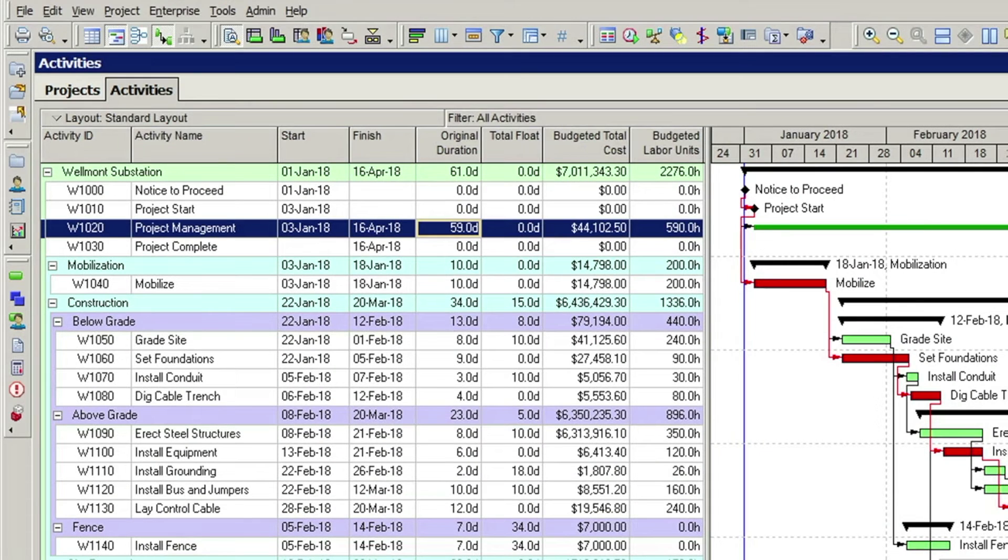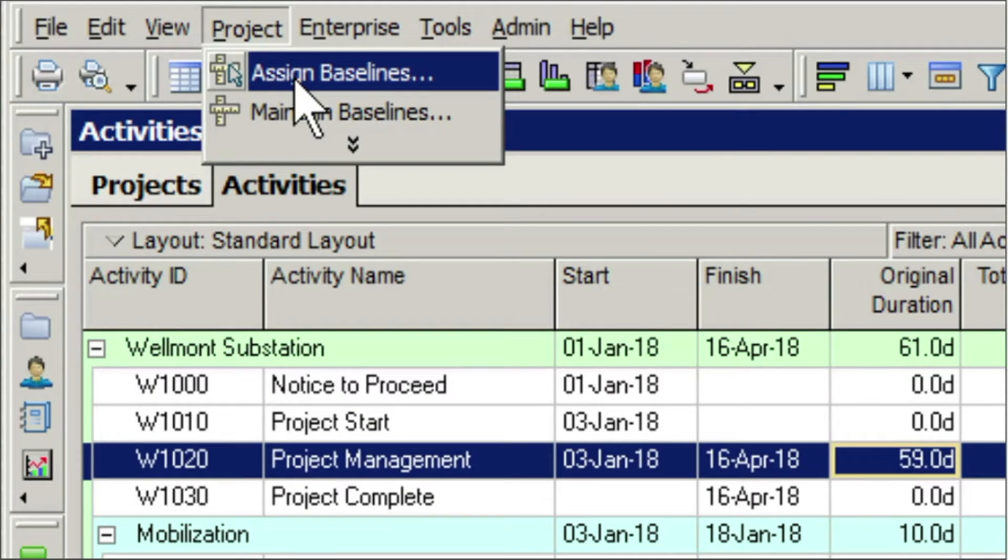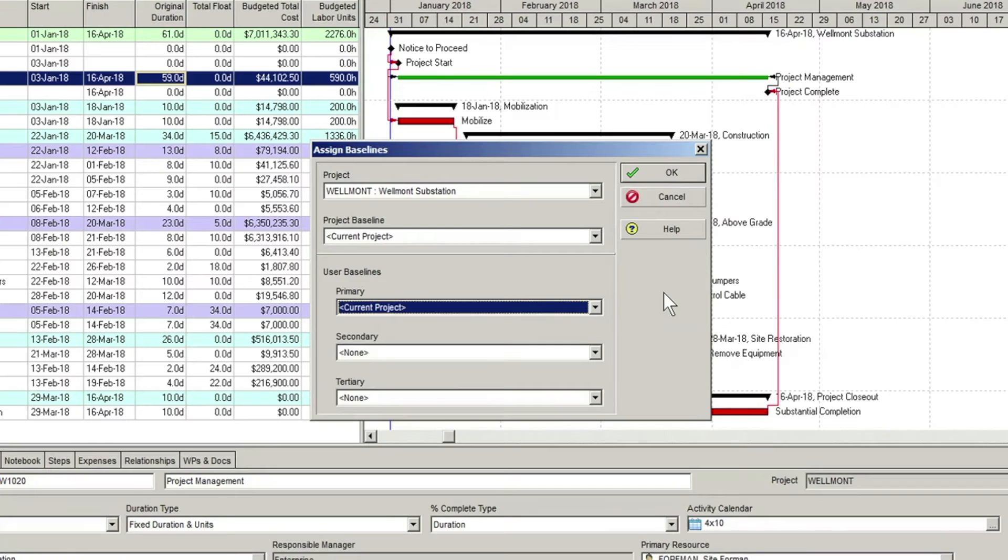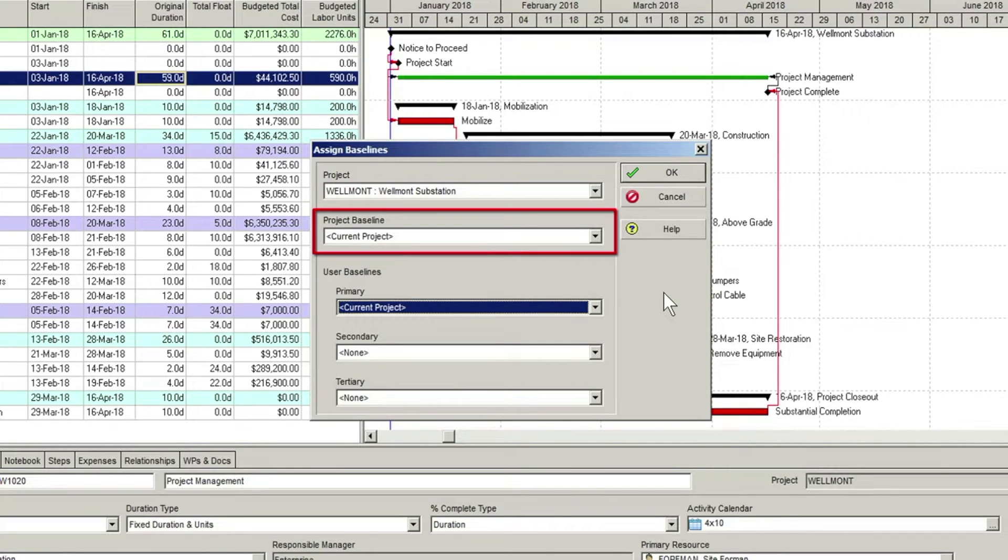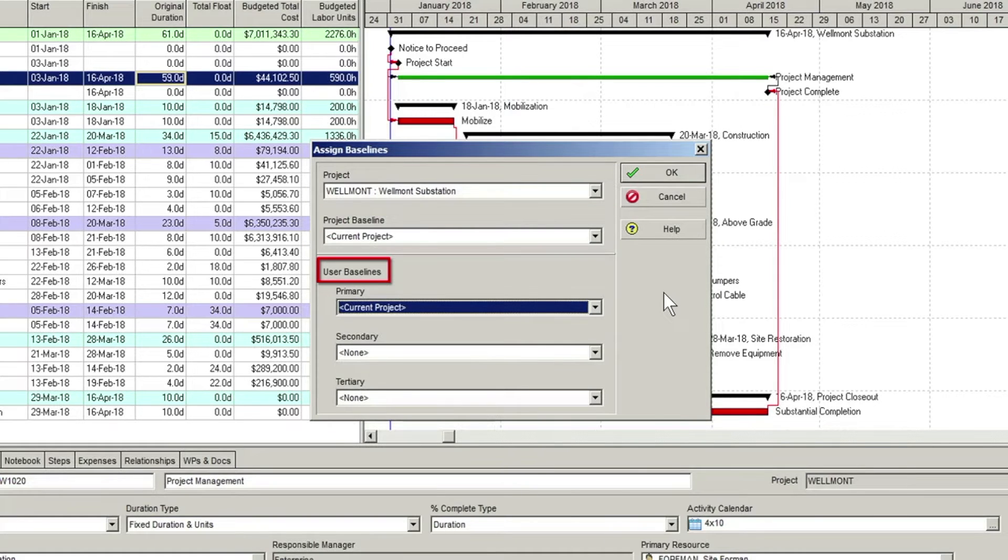The first step is to create a baseline, and the second step is assigning that baseline to the project. P6 has the concept of a project baseline, which can be thought of as the master baseline, and user baselines.